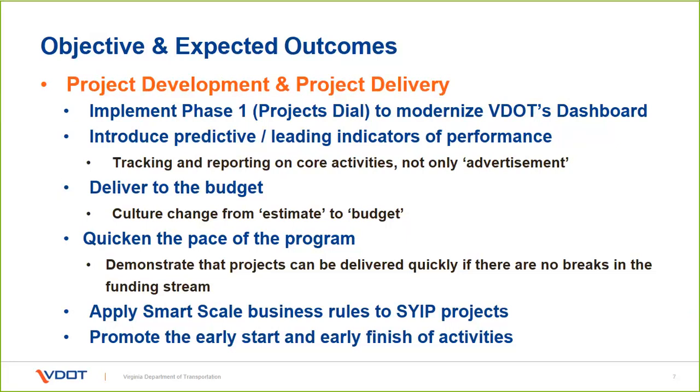We've got it set up so that once the CTB approves that budget, that's it. If you need more money, you've got to go back to the CTB to get that money. Whereas before you could go back and get more money for your project, now folks are going to have to be constrained to what the money is available for. So I think that's an important part.